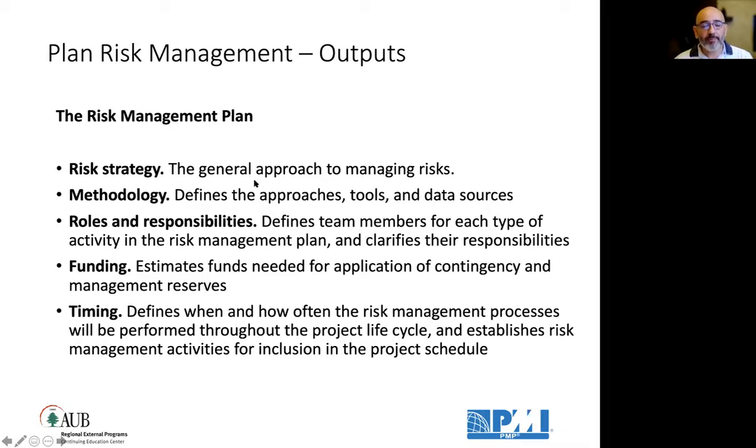How we are going to approach it? For example, at PwC we had an approach for risk management called ORCA. O stands for objectives, R stands for risks, C stands for controls, and A stands for alignment. So we start by understanding the objectives of the project, whether these are business objectives or project objectives, and then we brainstorm what risks might hinder these objectives. One objective might have 3 risks, or the opposite, and then we take every risk and we assess the controls.